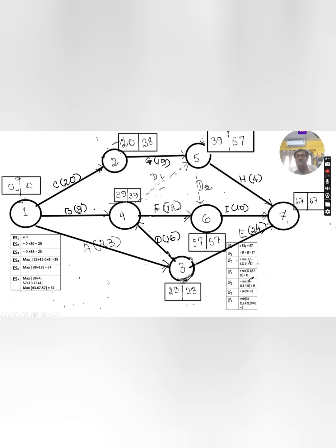Now ES3 for this node. Again, what will be the earliest start time? The earliest start time is 0. Add 23 days to reach this point. At least this time is required to complete this activity. That's why it is 23 days. The earliest start time for this node, ES3, is 0 plus 23. I have noted it here.